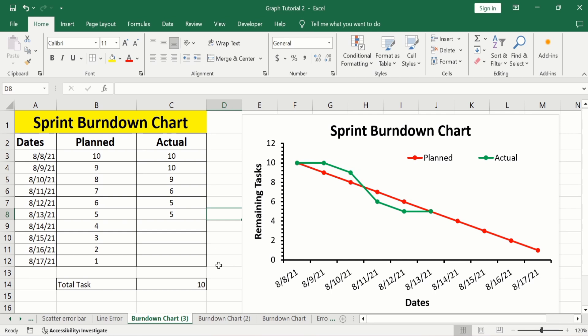In this case, we have to complete 10 tasks in a sprint, and we plan to complete one task on a daily basis. So one task is subtracted from this value — for example, 10 minus 1 equals 9, 9 minus 1 equals 8, 8 minus 1 equals 7.